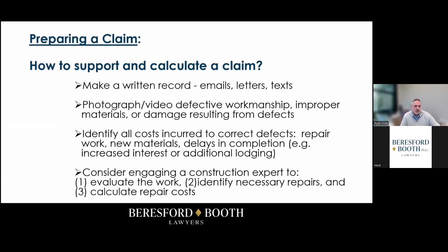One final thing to consider is engaging a construction expert to evaluate the work, identify necessary repairs, and calculate the repair costs. If it's a significant claim and a claim that you think may be on the path to future litigation, most of those claims, if not all of them, require some type of expert testimony to demonstrate the work was defective and to demonstrate what work was required to remediate the defective work. So bringing an expert on early is definitely to your benefit as an owner.